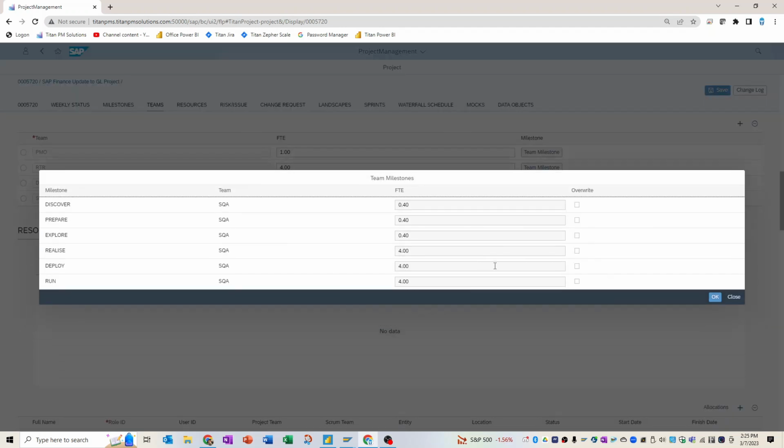If we look at their milestones, the first set of phases, there are 4 people who are only designated at 10% of the time. Again, this is not necessarily saying that has to be what it is. You can configure it to be any percentage, but it takes the FTEs that you were putting the project together at first and puts them at a slightly lower pace than with the rest of the phases that go out.